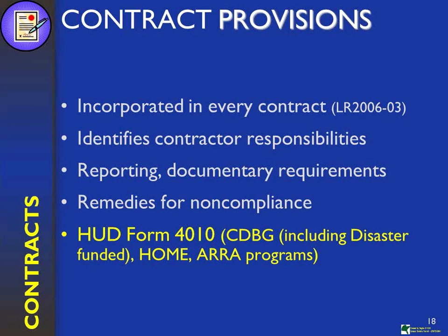It's a Davis Bacon poster that basically informs the general public as well as the workers that this is a project subject to Davis Bacon, and on that poster it should have a block with the point of contact, the LSO, or whoever that designated person is, so that if a worker had an issue or concern outside of his employer, he or she could go to somebody and feel as though there won't be any reprisal against them for raising a concern about perhaps their wages or something.